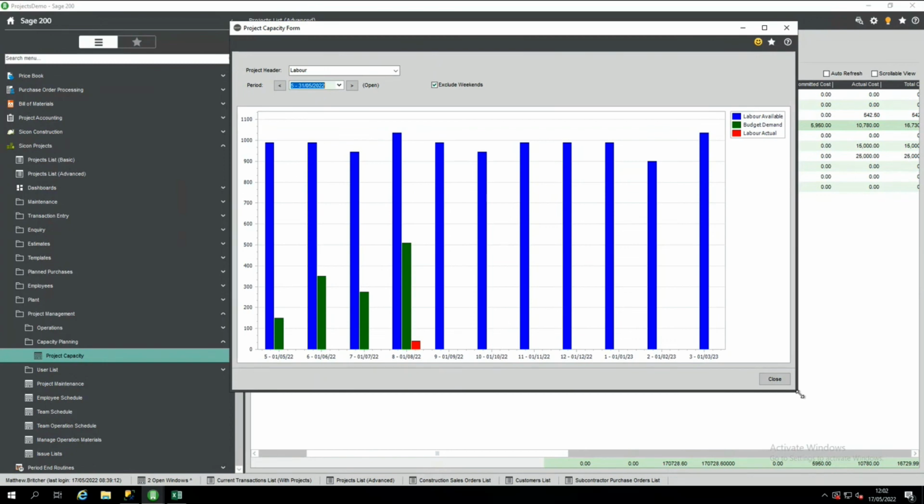Because it's quite a powerful tool if you're using it. Now, I think we've done a little shortcut for that one. We've got £50,000 worth of labour, and my hourly rate is this, and it works out how many hours you need. Or you could just put in the hours and it'll work out the rate for you, and that then feeds back into this.